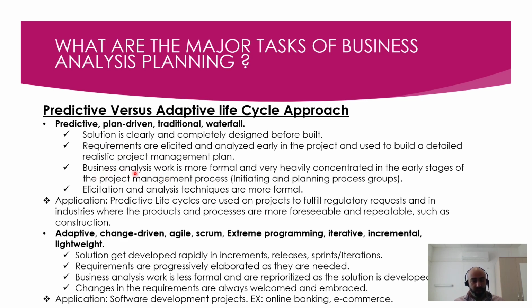Everything is rigid in terms of changes. Any change follows the change management process by the book. So it's very formal. Business analysis work is more formal and very heavily concentrated in the early stages of the project management process, the initiating and planning process groups. Very clear. Elicitation and analysis techniques are more formal than in adaptive.